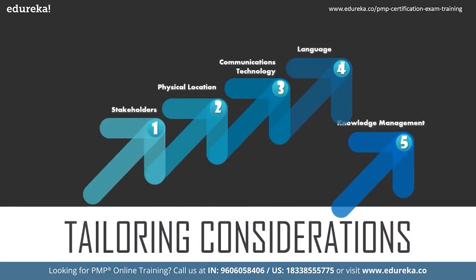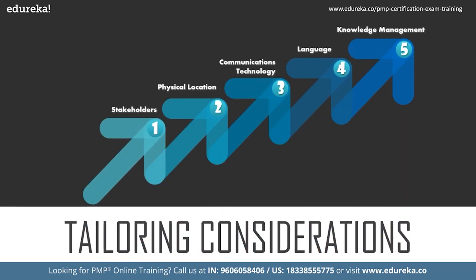While communicating and looking at those communication needs, one must ensure the communication happens as needed by the stakeholders. Stakeholders need to be identified. In the overall framework — 10 knowledge areas, 5 process groups, and 49 processes — the initiating process group has only two processes: one in integration management and one in stakeholder management. The project manager's first job after being assigned is to identify stakeholders. Identification of stakeholders is not a one-time job; it must happen throughout the project lifecycle, and their communication requirements must be understood.